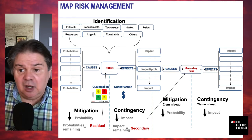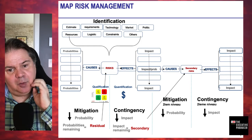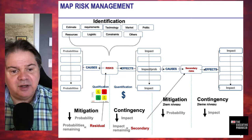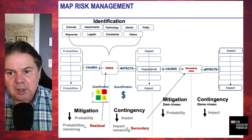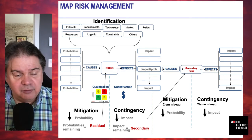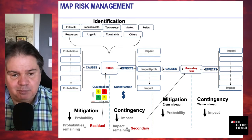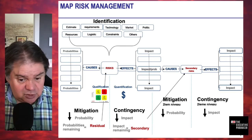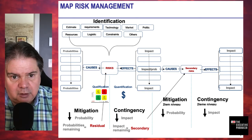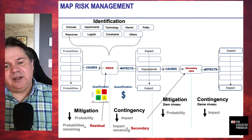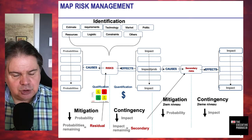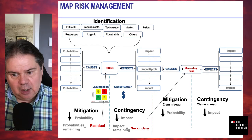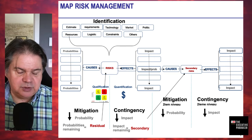Contingency means putting together that plan B or plan C, including the resources needed for mitigation. We also need to do quantification of the risk exposure — how much are we exposed, and how much do we need to invest to drive down the probability or effect? It doesn't make sense to invest a thousand dollars in mitigation activities if the exposure was only five hundred dollars — we'll just deal with it if there's an issue. Quantification helps figure out how much you need to protect yourself.